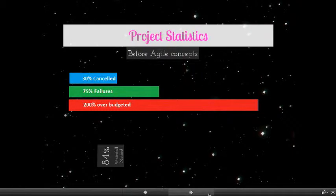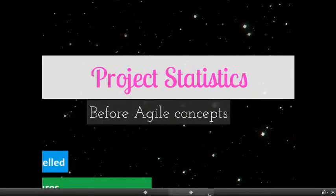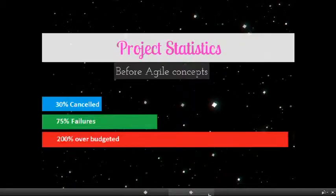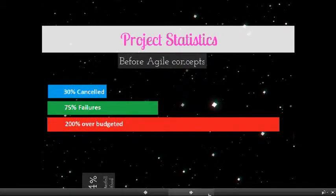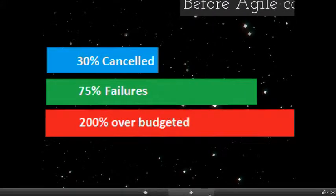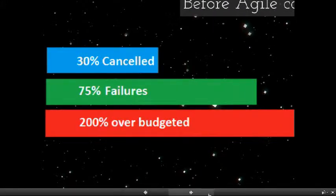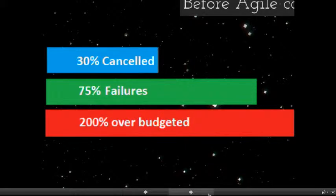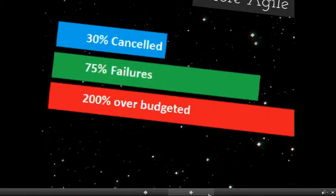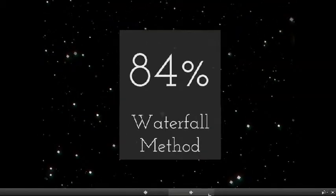The statistics of the projects that was done before Agile Manifesto: 31% of the software development projects were cancelled by the client, 75% of the projects were considered failures by the same people who developed it, 50% of the projects, that means one in two projects, expenses went over 200% of the budget.